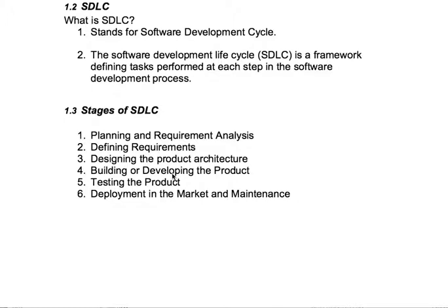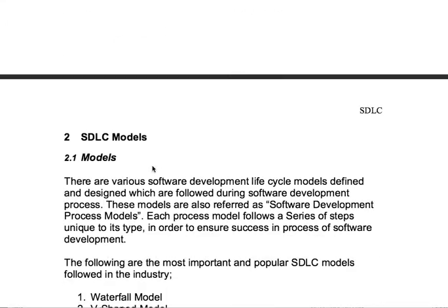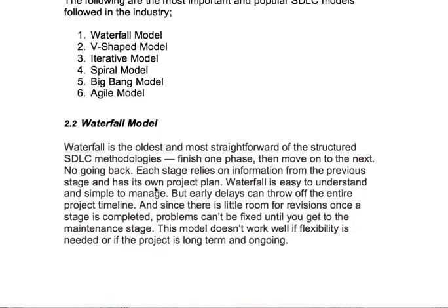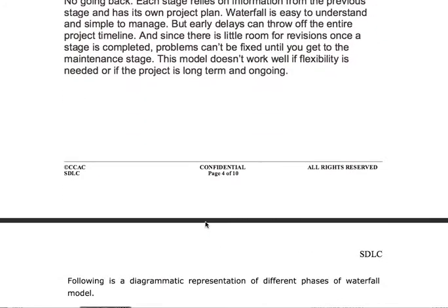In a lot of cases, what happens if it's over 2 weeks, probably what will happen is the project will be in a phase 2. So the business analyst and the project manager will allocate this information, document it, put it somewhere, so that at the end of the day, when you're implementing your application, you're already talking about phase 2, and these items will be added to another phase of the project. So that's just an example of what that meant there.